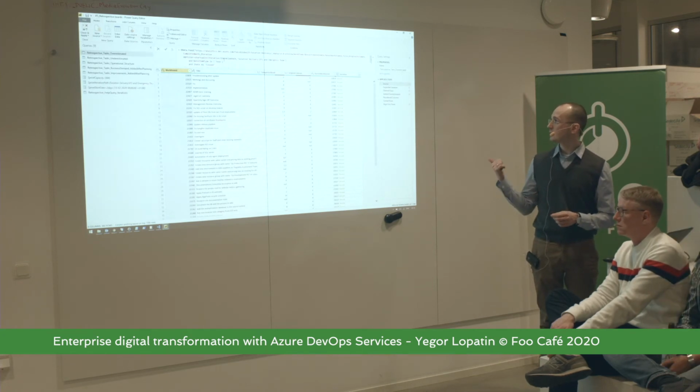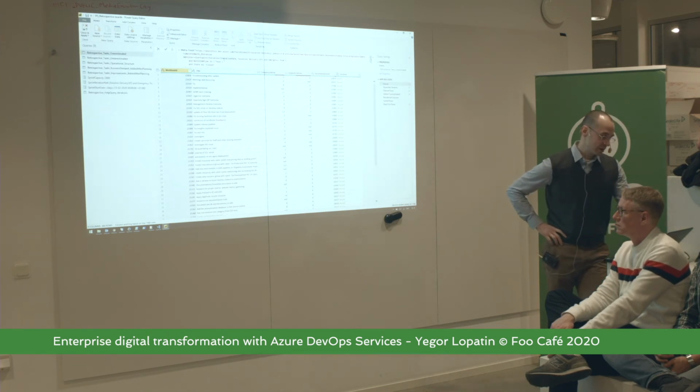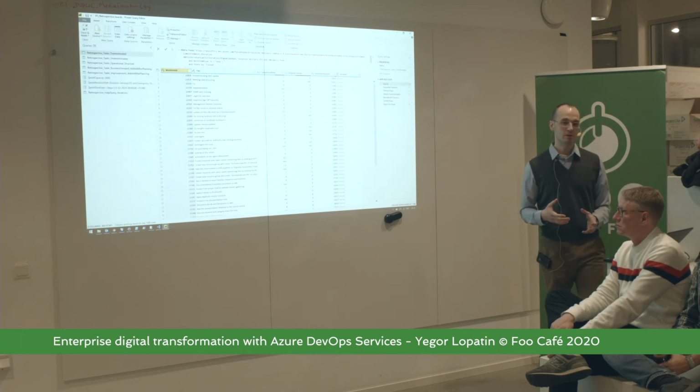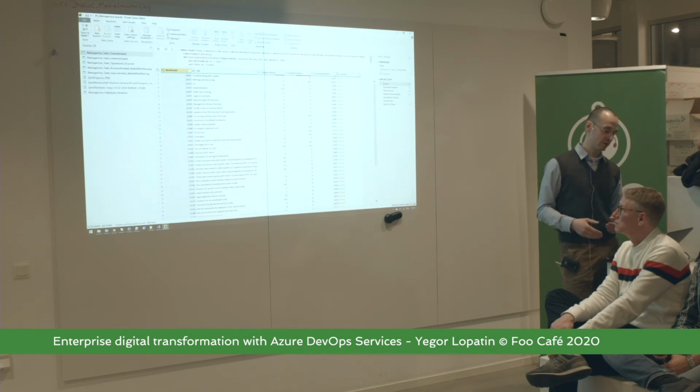services. After that, for example, our delivery team's first request was to see the top 5 underestimated or overestimated tasks, to see the dynamics and improve the estimations for the future, so as to make the work more effective.